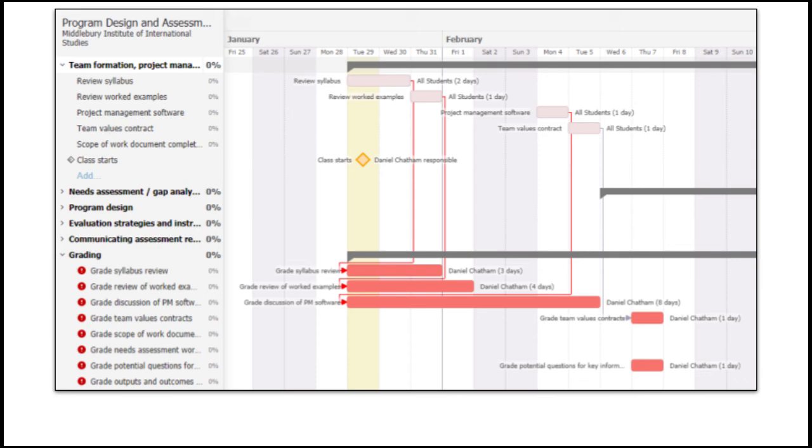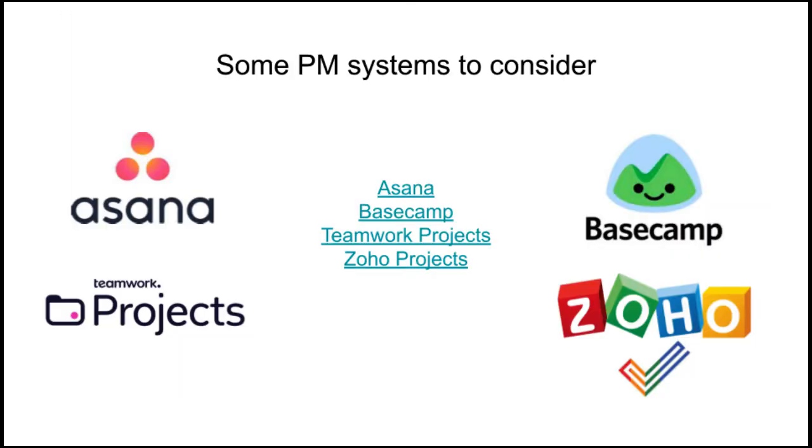And that's a great way to know if there's a block in the flow, or what we call a weakness in your critical path. If you've got a break in your critical path, that means that there can be a delay in the project, because if there's a dependent relationship, or something must be finished before something else can start, then it's really critical that the first thing be done first and not be delayed, because then it has a cascade effect for later parts of the project.